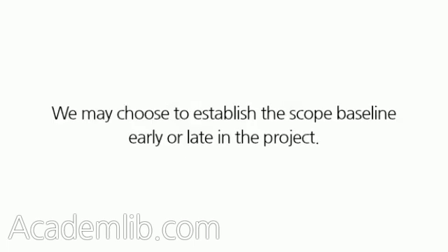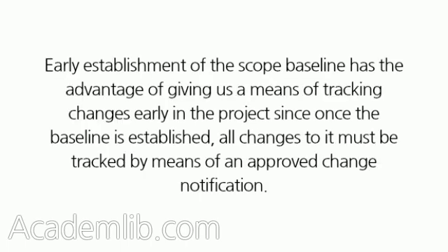We may choose to establish the scope baseline early or late in the project. Early establishment of the scope baseline has the advantage of giving us a means of tracking changes early in the project, since once the baseline is established, all changes to it must be tracked by means of an approved change notification. This is helpful for several reasons.